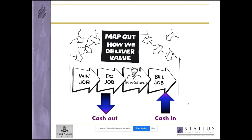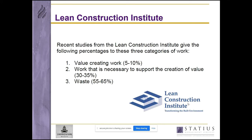At this point there are some figures from the Lean Construction Institute which might be enlightening. They've categorised construction work into three components: value-creating work, which they claim is only 5 to 10% of all work undertaken; work that's necessary to support the creation of value, estimated to be 30 to 35%; and waste — a massive 55 to 65% of the work undertaken. In order to improve the cash-to-cash cycle, we need to be more effective, more efficient and better organised.